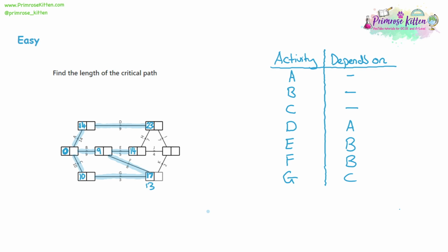And that's because we move on to the next activity in that network, which is activity K. So we're not in alphabetical order anymore, but we need to look at K next. Activity K depends on 2 activities. It depends on F and G from happening. So when we are saying, is it 17 or is it 13? We're saying when activity K can start.